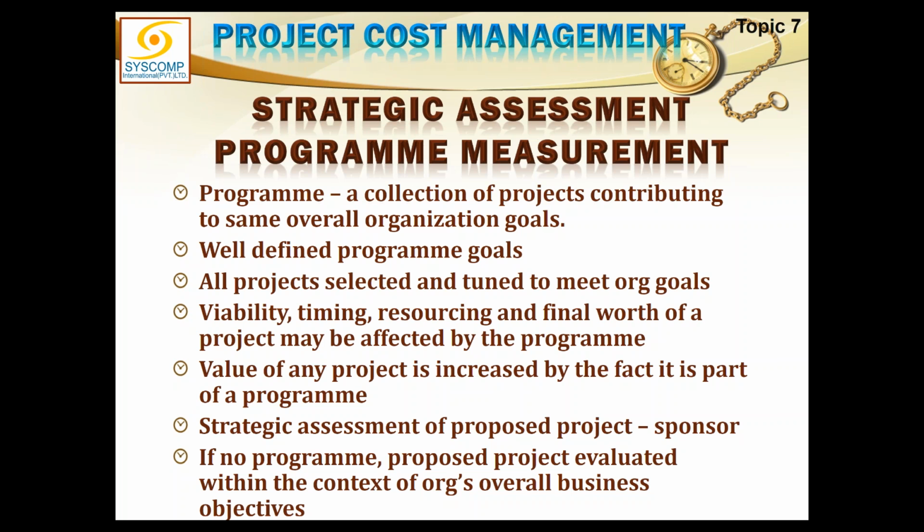If an organization has to decide whether to start a standalone project or a project within a program, no matter how equal both of these ideas are, the project which is going to be started within a program might be more important due to the strategic objectives of the program. Therefore, that would take a strategic precedence.